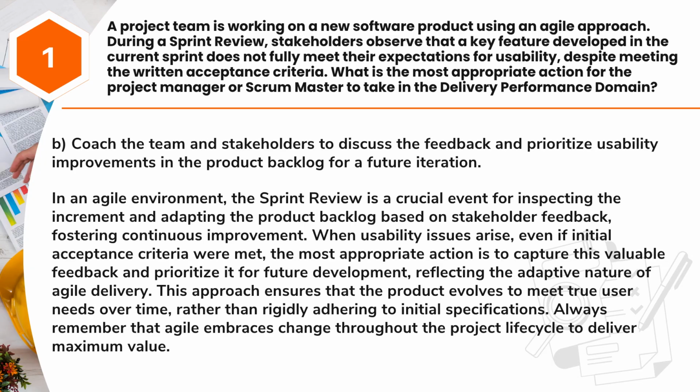Answer: B. Coach the team and stakeholders to discuss the feedback and prioritize usability improvements in the product backlog for a future iteration. In an Agile environment, the sprint review is a crucial event for inspecting the increment and adapting the product backlog based on stakeholder feedback, fostering continuous improvement. When usability issues arise, even if initial acceptance criteria were met, the most appropriate action is to capture this valuable